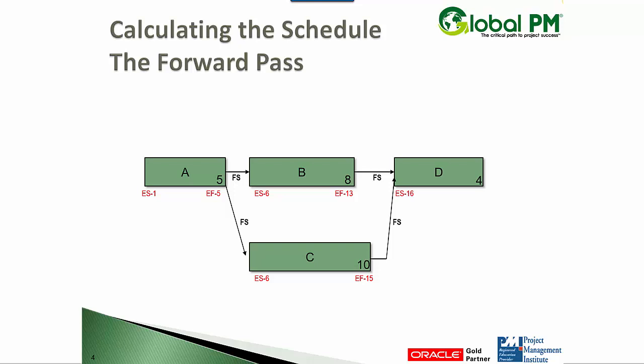And if it finishes four days later, it's all of day 16, 17, 18, and 19. So what we just did is a forward pass, which calculates the early and late dates. Now what we want to do is focus on what's called a backward pass, and we will use that to calculate the total float.